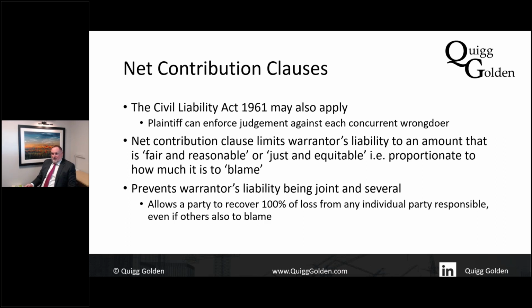So in other words, if all three parties were there and the court would have said a third, then even if two of the parties aren't there and you're the last man standing, your liability will be limited to a third. Okay, so that's important to get in there. Otherwise, you could end up being liable for 100% of the loss, even if your contribution to that was relatively small.